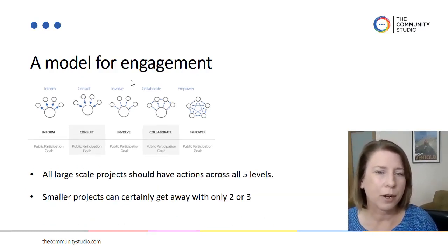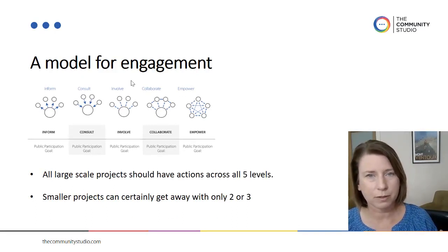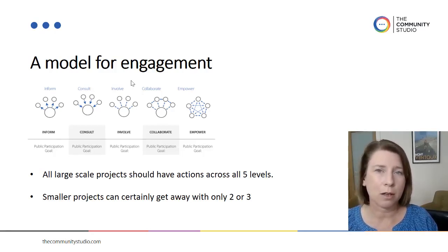Now, large-scale projects should have actions across all 5 levels of engagement, with different stakeholders involved in different elements. And this, or who is involved in what element, is very much dependent on stakeholder analysis and deciding the impact on stakeholders and what their influences are, and therefore what their needs are.